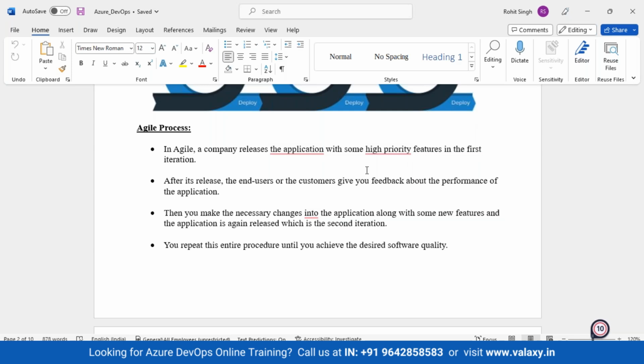These are all high priority features which you will develop at the very first. Then you will build that particular module, then you will deploy that particular module, so that once all these features are deployed, at least the client can introduce the website to the market, and later you can keep on adding all the small features, so that development work keeps going. So in Agile we focus on deploying the high priority features in the first iterations.